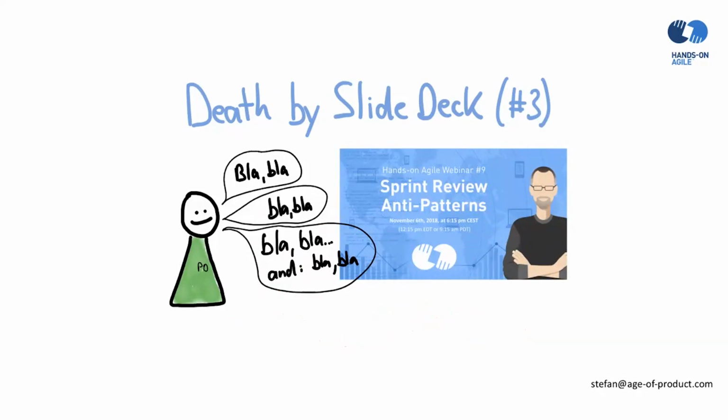Participants are bored to death by PowerPoint. Okay. Agreed. We need to check the backlog. But checking the backlog in this situation does not mean using Jira, Excel, or PowerPoint. For example, you also could recreate the current product backlog items on stickies and put them on the wall. Or if you have a copy of that on your wall anyway, just move it to the area where the sprint review is taking place so everyone can see what is currently available in the product backlog to inspect it at a later stage.